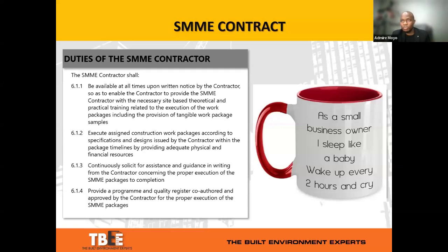to enable the contractor to provide the SMME contractor with the necessary theoretical and practical training. So here we haven't defined the extent of the training that the contractor should provide. So that would be on a project by project basis. But what we're essentially saying there is there must be some engagement between the contractor and the SMME contractor of the basics in terms of that contractor's specific work packages.